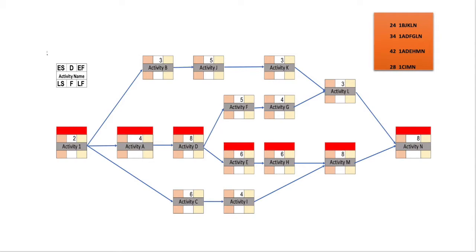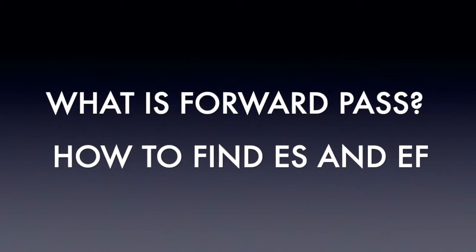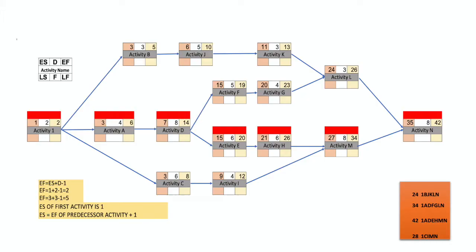That we can find out without finding any early start, late finish or early finish. You only need to find the critical path. So you sum the durations of all the activities in all the paths, and ultimately you will find the critical path.